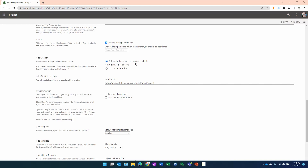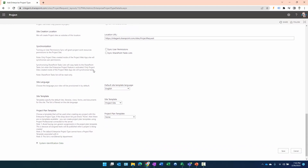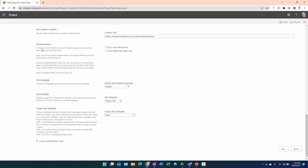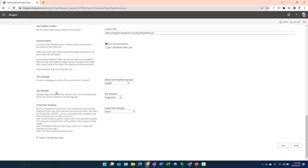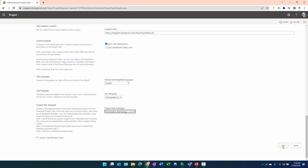We want the synchronization of project site permissions to take place automatically so we don't have to add users manually — we'll select Sync User Permissions. We're not going to sync the SharePoint task list. For the site template, we select the IT Template v12 we created earlier, and for the project plan template, we select the Information Technology template we created. Then we click Save to save the first Enterprise Project Type.